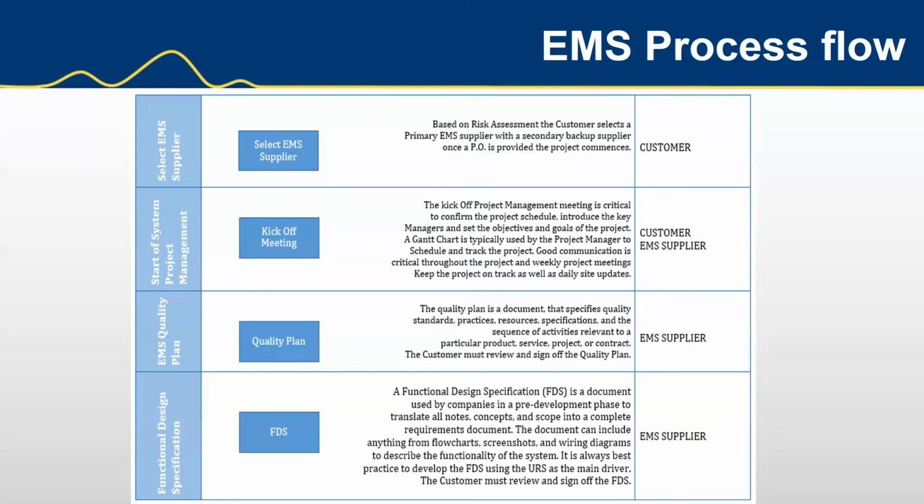So they define things a bit more. And then the functional design spec will get updated to the next revision and so on, as long as you're keeping a good change control management process going on.